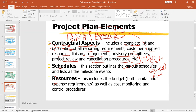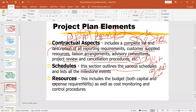Then schedules. Every task has a predecessor. So if you start with zero today, you can start task one and task two separately. If task one and task two finish, only then you can start task three, four, and five together. These sections outline the various schedules and list all the milestone events — the tasks you want to start and finish. You must have a schedule; without a schedule, it is really impossible to monitor a project.